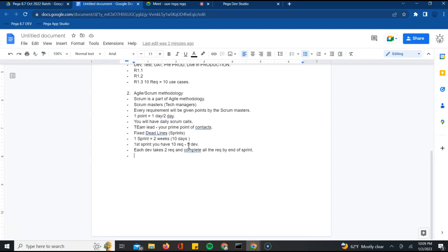Of course we will try our best, but it's always good to be upfront and tell them, these are some things which we won't be able to accomplish in this sprint, initially during the start of the sprint, so they have a clear understanding of what is going to be delivered. So they don't believe that this is also coming as part of this particular release, and then at the end of the sprint you are like, oh sorry, we were not able to accomplish it. Not good for anyone. So it's always good to forecast that.